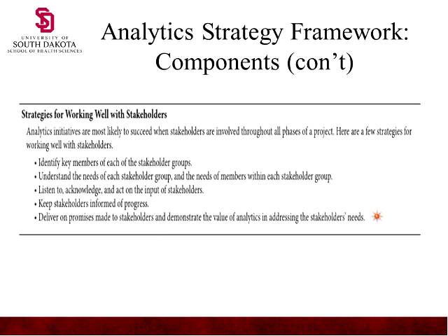Now, if you can't do that, if something happens, we started a project when I was in charge of project management in the university, and the project we thought was going to be a 2-week project turned out to be a 2-month project. And so I had to go back to the CEO and say, these are the reasons I can't finish this in 2 weeks. I can give you data in 2 weeks, but it won't be the data you want. In 2 months, I can give you great data. In 2 weeks, I can give you preliminary data. Which do you want? Well, he wanted both.